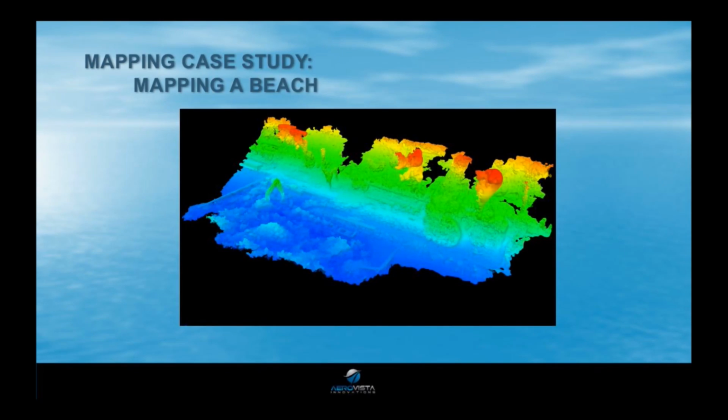And also, notice the slope here going from the red side to the blue side where the water is. That is highly susceptible to erosion. So based on the data that we were able to get from aircraft like these, we were able to plot how much gradation there was from one side of the site to the other and prevent some of those erosion problems that could have occurred.